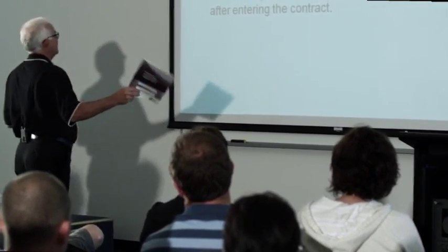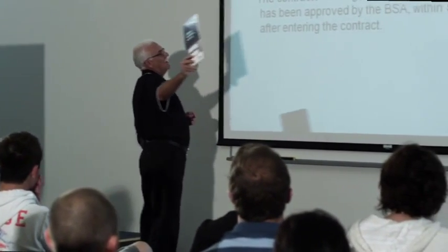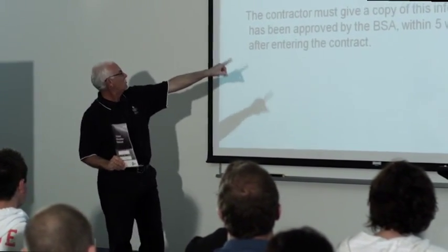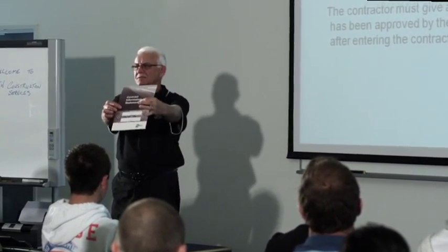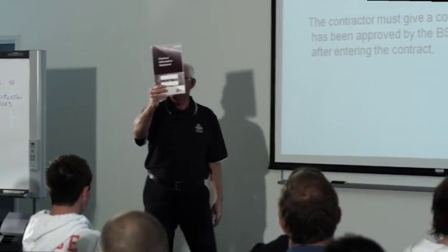You've got to give one of these to the owner. And it's got to be done within 5 working days of entering into a contract. So you can't just give them a contract and this. You've got to give them one of these as well.